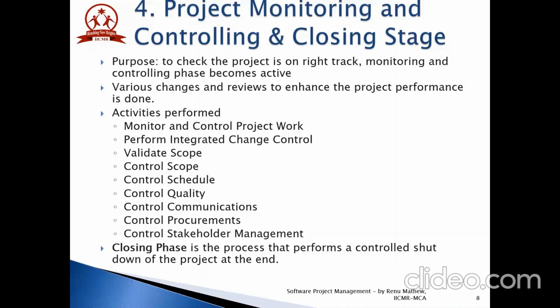The control procurement process is a closure phase involving monitoring the vendor's performance and ensuring that all contract requirements are being met. The control procurement process involves verifying whether goods or services are being delivered, whether they are delivered on time, whether the invoice charged is for the correct quantity, whether all conditions of the contract are being met, and whether the relationship between buyer and seller is managed properly.